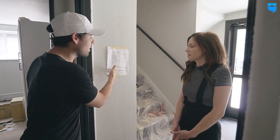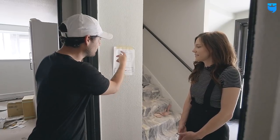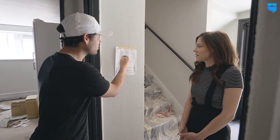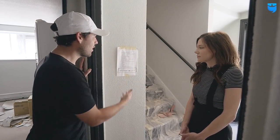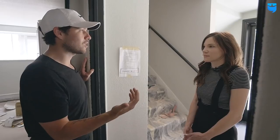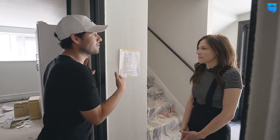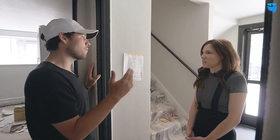And naturally, if they get it done in time, they get a little bonus at the end of the month. And if not, here I have the date that it needs to be done by and the list of things, so that way they can always go by, check it off, and be looking. Because sometimes the lead sub or GC isn't always on site. So the other guys in the crew need to be able to go, instead of having an excuse, oh, Juan wasn't here, blah, blah, blah.